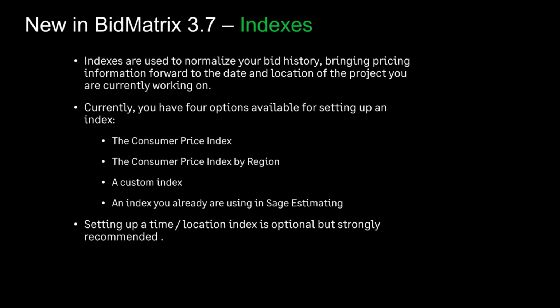Even if you were to just create a simple cost index where maybe you enter inflationary data on an annual basis and use a default inflationary factor, maybe you inflate costs every year by 3.5%, that is probably going to be more valuable than not having an index at all. So it is strongly recommended that you set up an index.